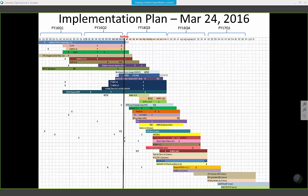So, Dave, please reread the milestone. Complete the NWPS deployment at 35 coastal WFOs. So the 35 means the West Coast included. Yeah, 224. And so will we meet it? The answer is? So 1.1, which is Western Region Alaska, is mid-September. So if it was by the fourth quarter, then we're on track, Dave. Okay. Yeah, and Andre and Roberto are already running all the West Coast ones. I have to check the Alaska ones, but we're already running all the West Coast ones in the EMC parallel, so that was really good.